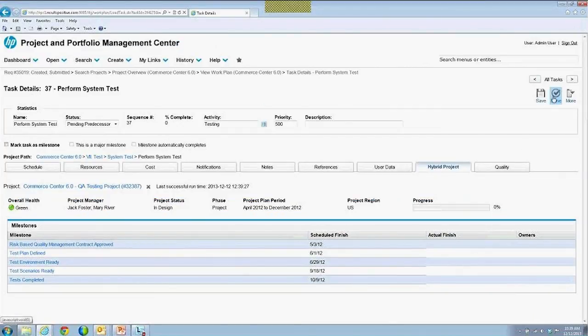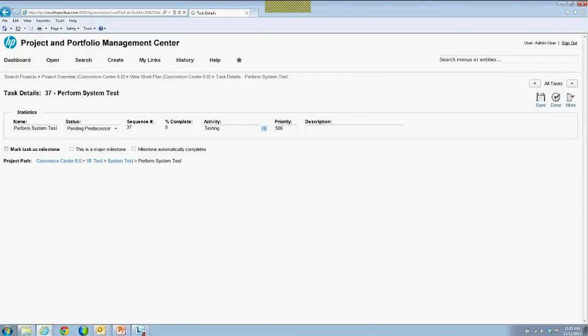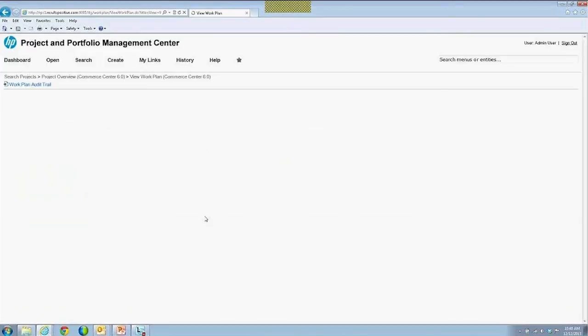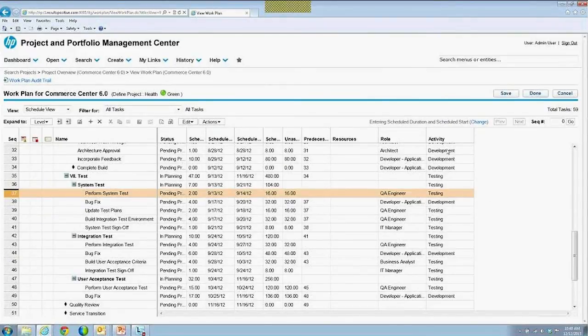And if we save that and say we're done, I think the difference is that it's fundamentally just showing you the timeline view of the work. It's not going to roll up the financials, for instance, from this sub-project into the project. It's just a different view where you see the overall timeline. Let me see if I can get back to the summary of this now.